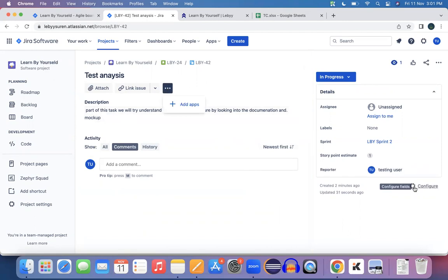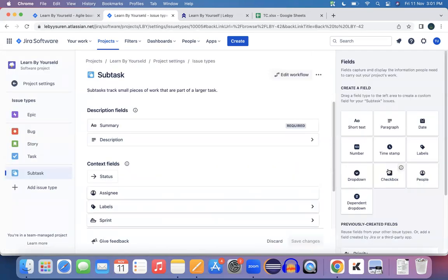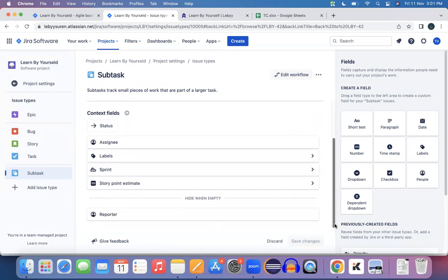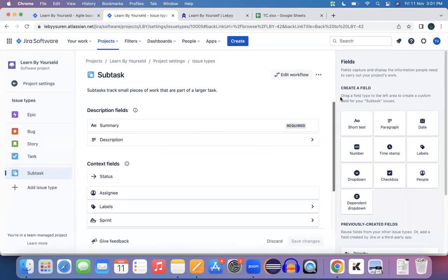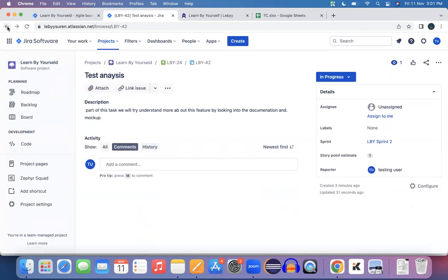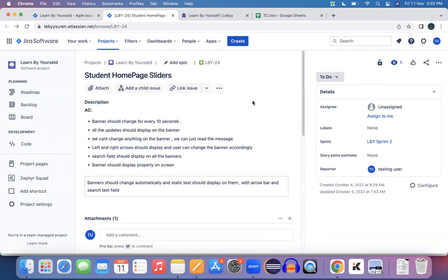Assume you have a plan for 8 hours; you need to list down whether those 8 hours were completed or not, how many hours you have worked on this one and how many things were completed. Once you are done with your analysis, you will mark this as Done. Each and everything you need to update here so that the Scrum Master will have a track on these individual items.